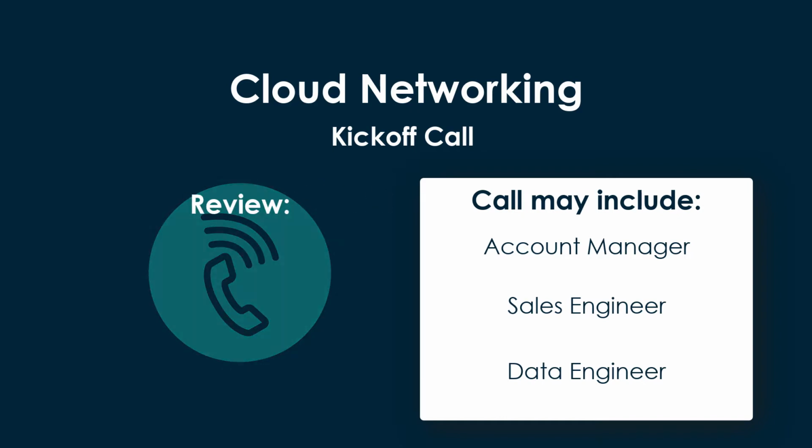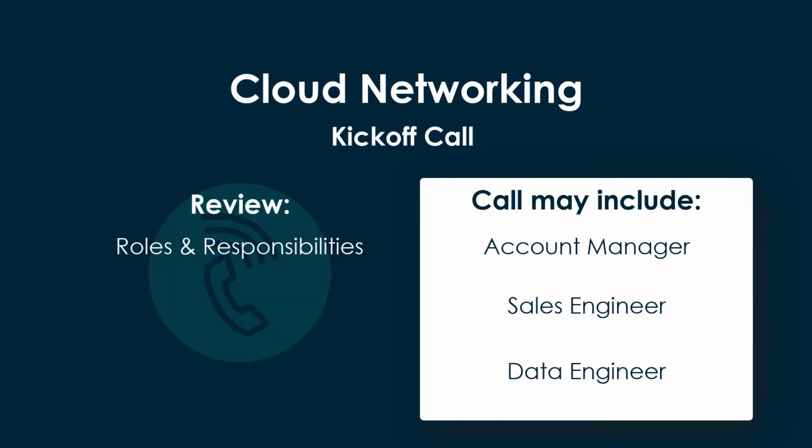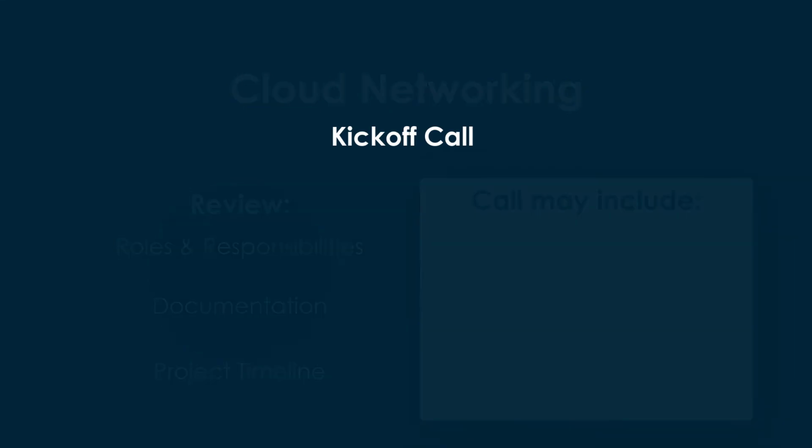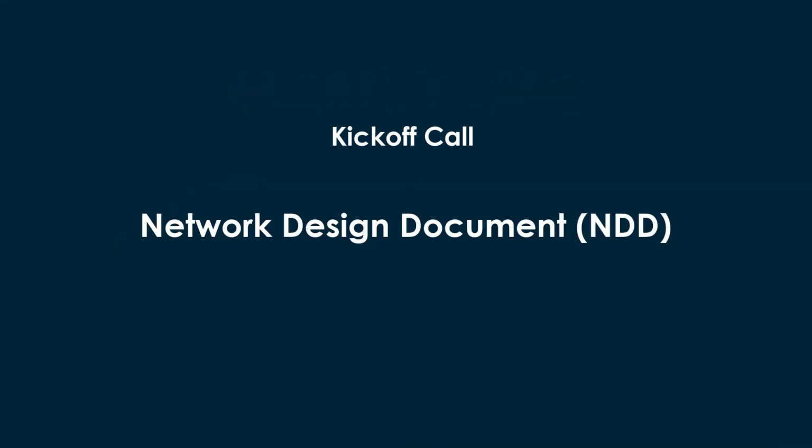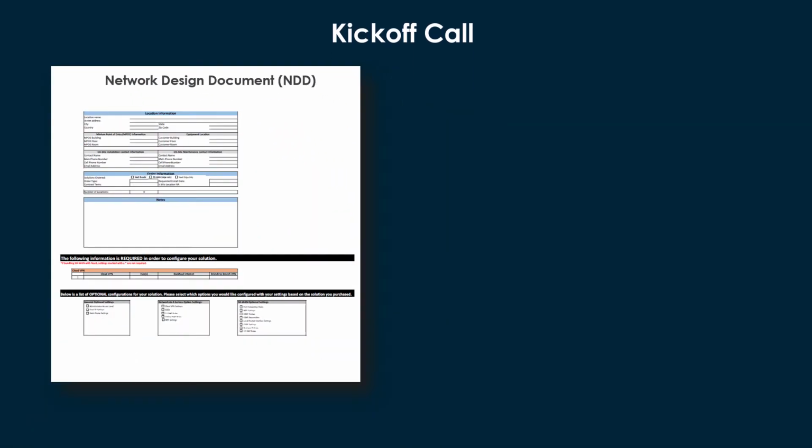During the call, roles and responsibilities will be identified, documentation will be verified, and the project timeline will be reviewed, which will vary by customer or configuration. The network design document, or NDD, will be started during the kickoff call, which customers are expected to participate in. If you have a third-party IT resource managing your network, please invite them to the kickoff call or let your CBTS project manager know if a separate technical call needs to occur at a different time.